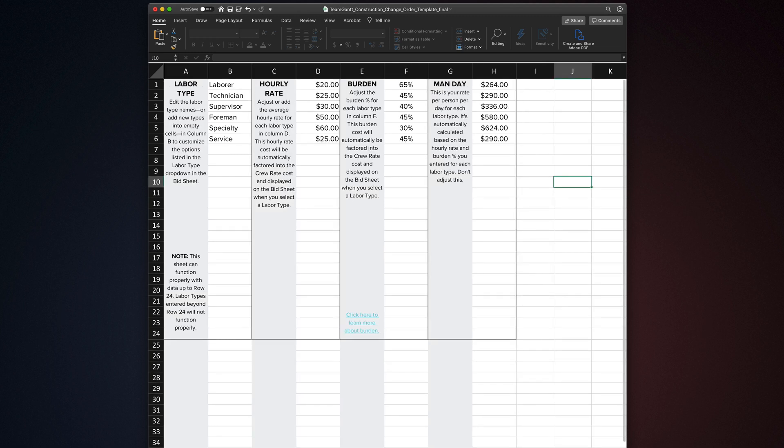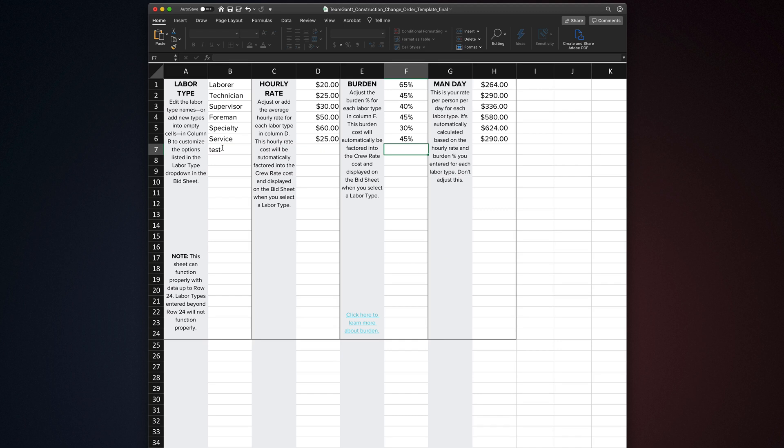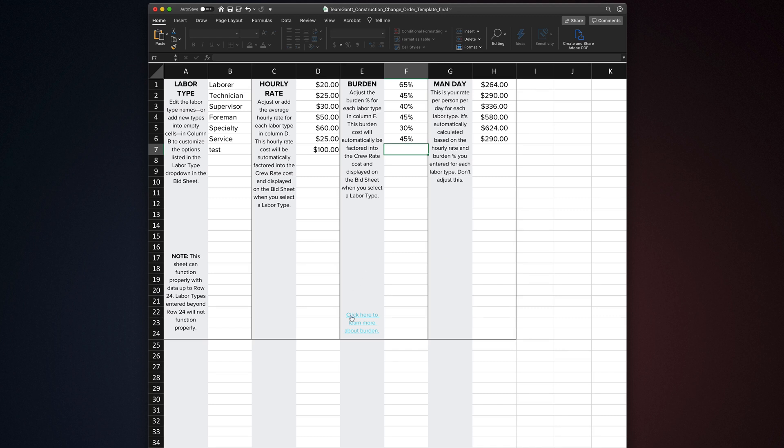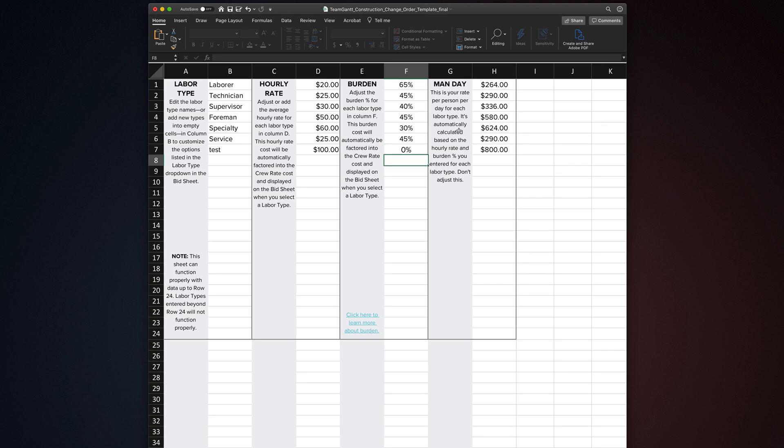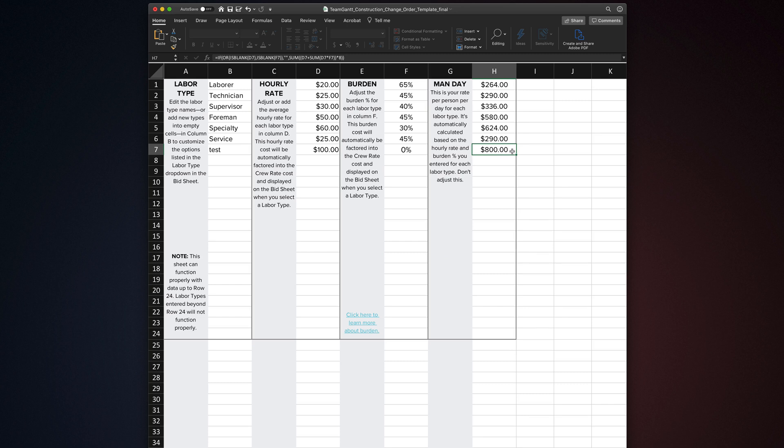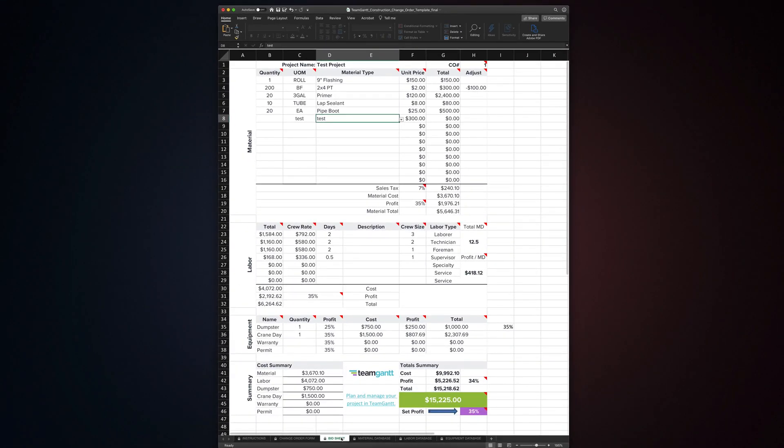The same is true for the labor database, but it works slightly differently. You can add or edit labor types in column B. In column D, add or edit the average hourly rate for this labor type. Column F is where you'll factor in burden percentages for labor types. If you're not familiar with calculating labor burden, there's a link at the bottom of this tab with information on what it is and how to factor it. If you don't want to include labor burden, just enter 0% in this column for that labor type. Once you add or edit a labor type, its man-day rate will be calculated in column H. This is the number that is used to calculate the labor cost for that type of labor on the bid sheet. You can add up to 24 separate labor types in this template. When you add or edit a new labor type, it will then be available from the labor type drop-down on the bid sheet.